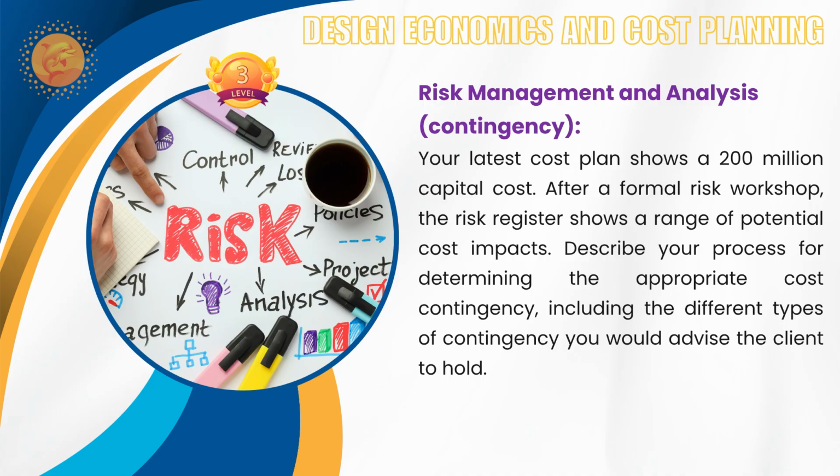That is generally 20%. So that means it will give the cost of around 80% probability of not exceeding the total budget. So these types of contingency you have to do when you are doing design contingency, which is QoS controlled for risk associated with design development, ambiguity, then managed by QoS and drawn down as the design is fixed. Now design development completed, then it will come down.